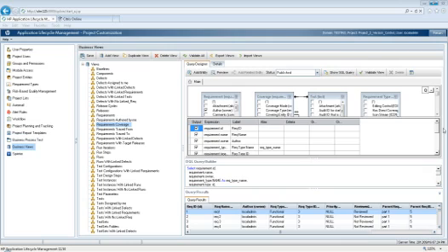So now Melvin goes in. Once he checks in the particular requirement, the particular record, you set up, it's very quick, very easy to set up. Once he clicks the check-in button and says OK, an email will automatically be sent to the next guy, Kevin, saying, hey, listen, Melvin has just checked in this requirement, go check it out. Kevin goes in, checks it in, checks it out, does whatever he needs to do there. Then once he checks it out, he'll go to the next group, and the next group, and the next group, and so on and so forth. So definitely, yes, you can use a workflow to manage your requirements using the workflow in the backend.